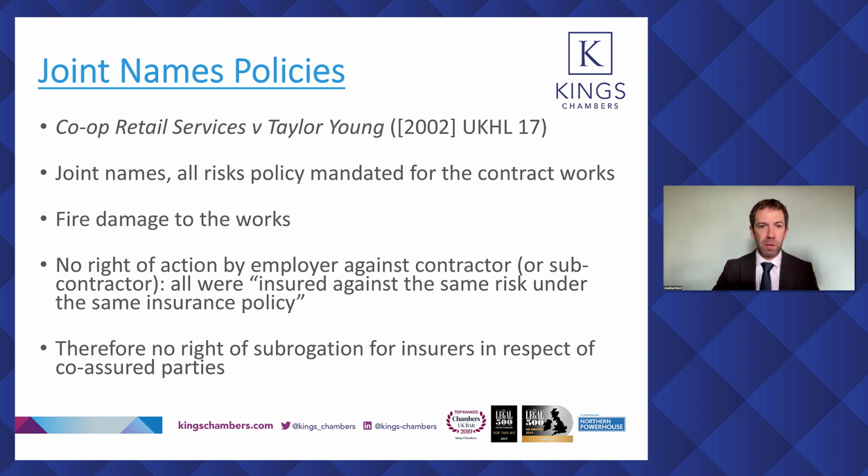because they're not especially relevant. But the basic proposition that emerges from that authority is that joint insurance under the same policy for the same risk will generally mean no claim by one co-assured against the other and no right of subrogation. Note the word generally, which we'll look at some examples which are more specific in due course.